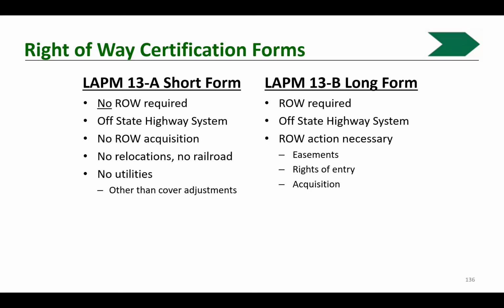And again, NEPA doesn't have a 1 year rule for certification. That's the right-of-way cert. Well, NEPA should be reviewed and verified that the NEPA matches the current scope and/or has been modified to match the current scope. CEQA should do the same thing.